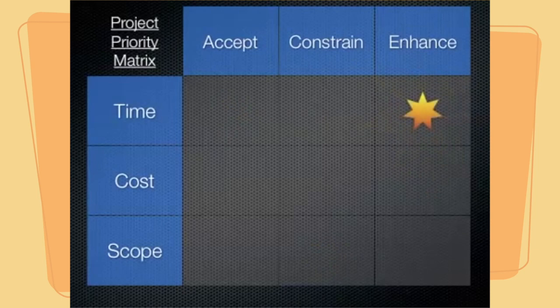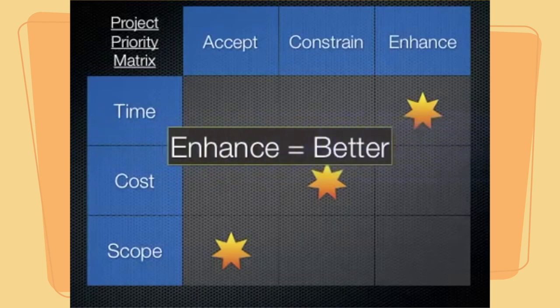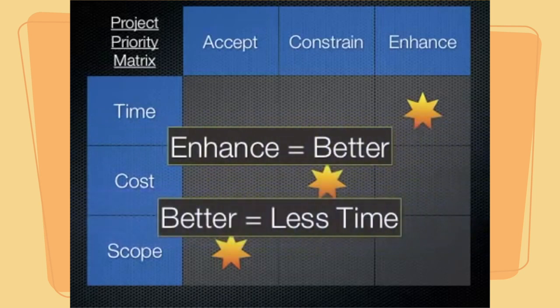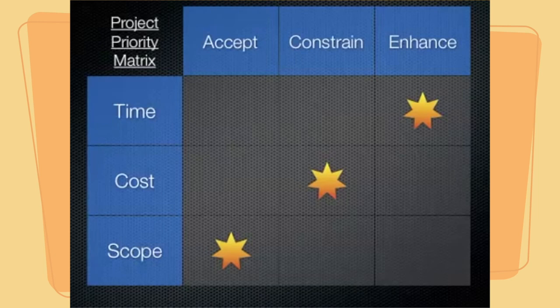Let's look at one other example where we are going to enhance time, constrain costs, and accept changes in scope. We use the word enhance to mean make something better, so a project has enhanced time if it is done in less time. In this particular example, we are constraining costs and are willing to accept changes in scope if it means we can actually get the project done a little bit earlier. Obviously, we will be communicating these trade-offs with our stakeholders throughout the project, but this is a very useful tool to establish up front the type of trade-offs we are willing to make as the project proceeds.